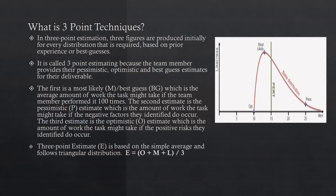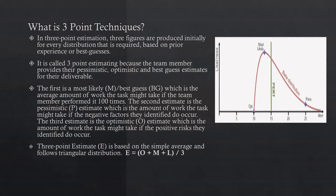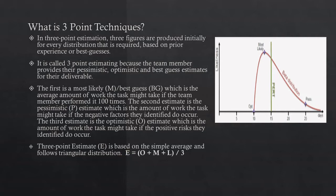Three-point estimate is based on the simple average and follows triangular distribution. Sometimes some organizations call this PERT, but three-point estimate technique and PERT are very much different, so don't be confused. As you can see here, the estimate is calculated: E = (O + M + L) / 3, where O is optimistic, M is most likely, and L is pessimistic. This is the calculation of triangular distribution.